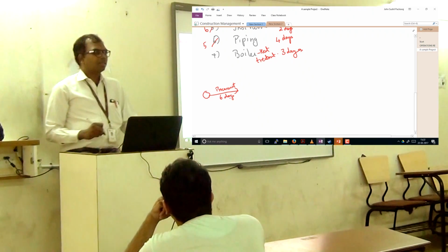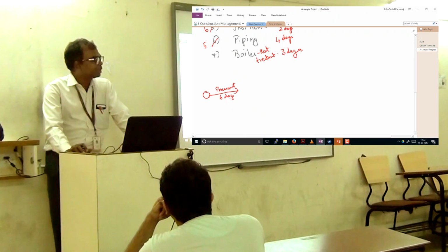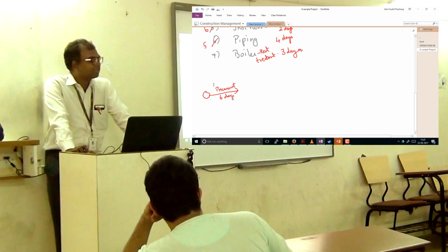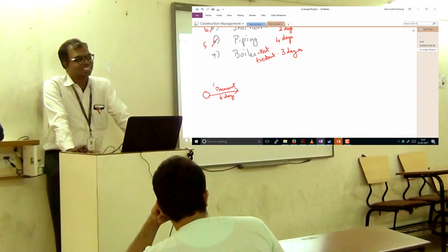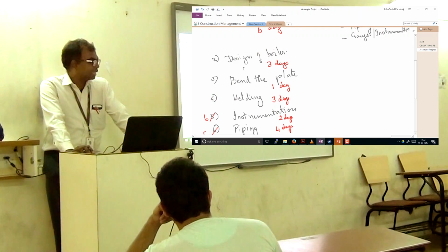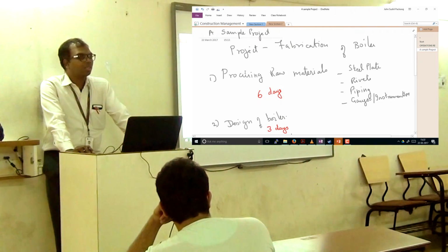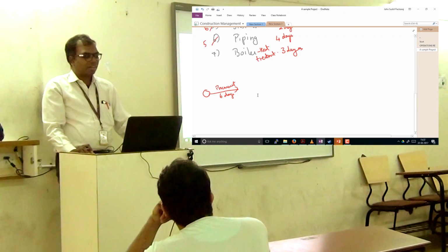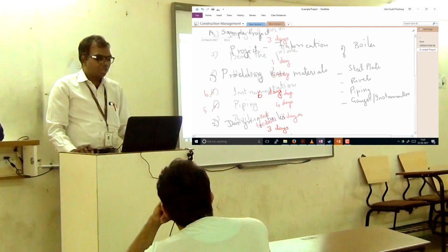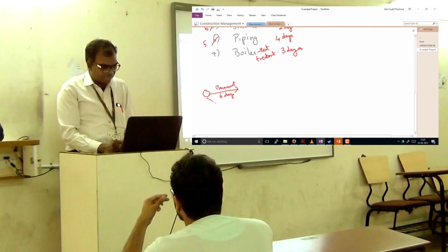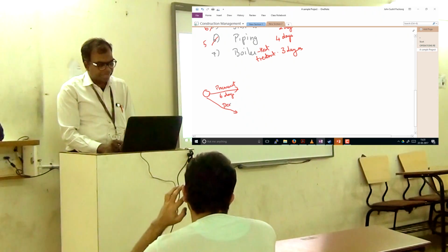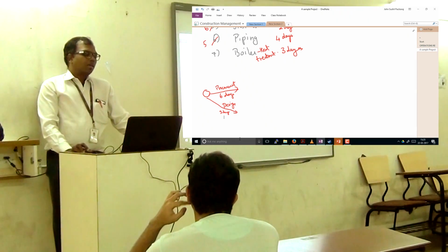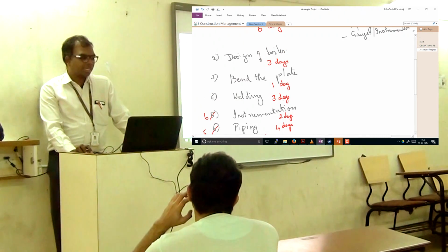In your opinion, do you think procurement and design can go hand in hand, or should design be done first before procurement? Both can be done at the same time, because if I don't, you will find that you are going to extend the project unnecessarily. That means after these 6 days are over only, I will be starting the next job. To avoid that, I can as well start doing it right now. So I put it as design. Now my design only takes 3 days. And so on and so forth. We got the rest of the stuff.